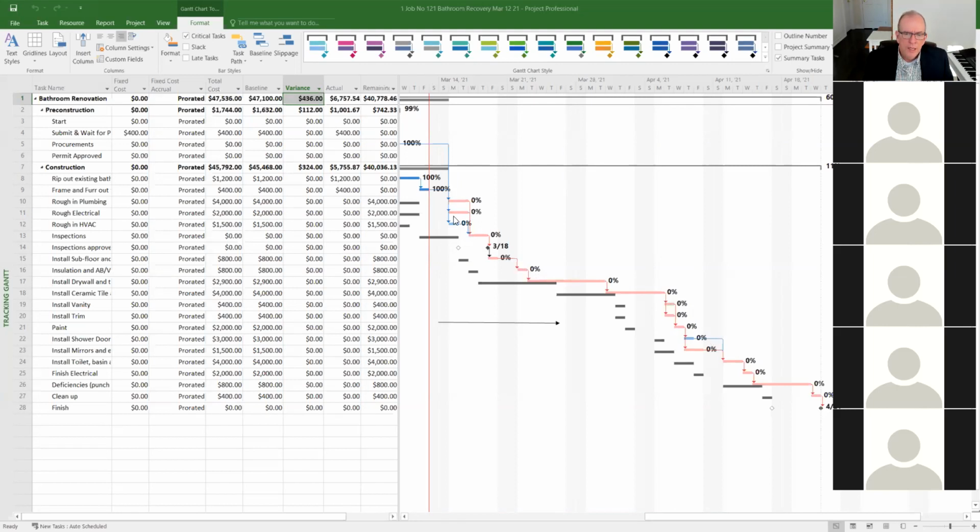And then the I is what? Anybody remember? The I is immediate. I want to try to get it somewhere in this zone. This is a short project, okay? I don't want to get it in this zone, because something else is going to happen. If I make cleanup one day now instead of 3 days, then I've taken out any flexibility later on in case something else happens. So you look immediate, sooner rather than later.